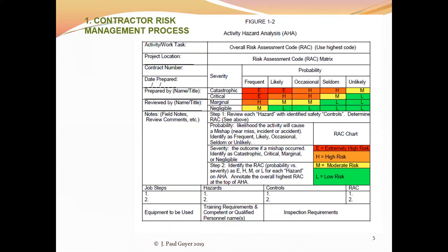Construction of the foundations for the building involves setting the forms for the concrete, pouring the concrete, setting the metal devices in the foundation walls, etc. Similarly with the utilities: trenching, placing the utilities in the trench, covering them, etc. So there are various steps, and you go through the whole process with whatever your project is.